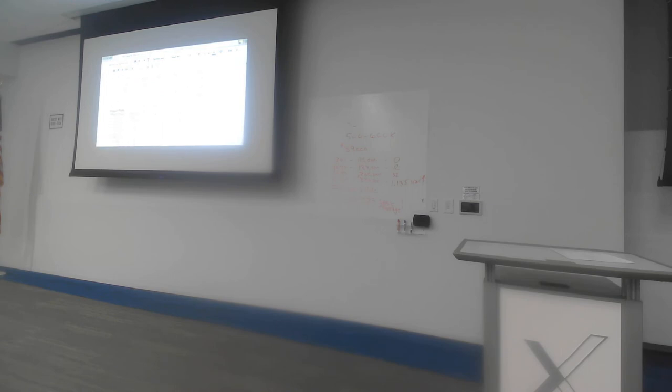Again, I'm going to keep track of crashing E by another day, how that's going to change my different paths. So again, the critical path is going to reduce by one day. That goes from 17 down to 16. It's not on that path, so that stays at 14. E is on this path, so that goes from 16 down to 15. It isn't on this path, so that stays at 11. And E isn't on the last path, so that stays at 15. Again, my critical path is still the same. It's still the one with the longest duration, so I can keep going.